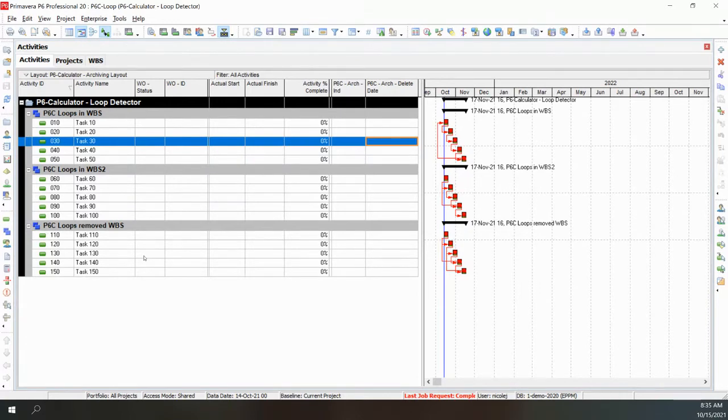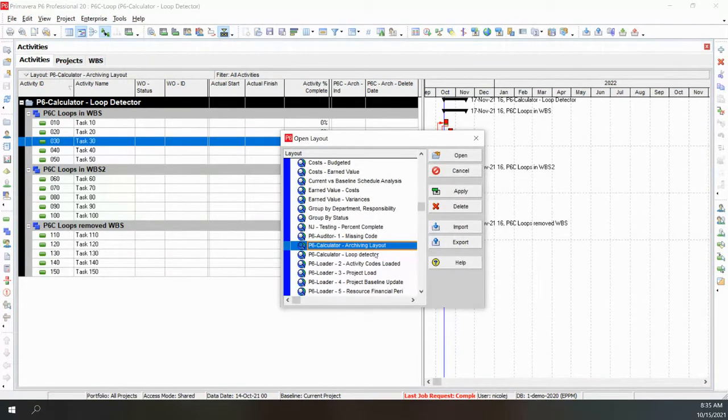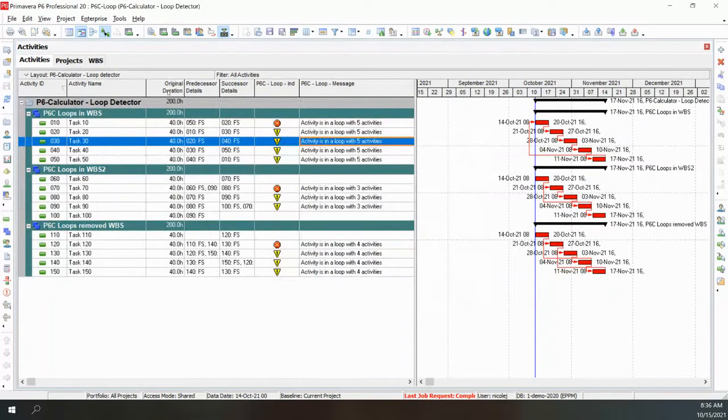Now, there's a job service inside P6 also, which allows you to move the data date and auto schedule. We've had some struggles with it though, with some of our larger clients. It doesn't always work properly, and what we're finding is sometimes it does error out. So we had built an auto scheduler for previous versions, so we are still using that with many clients. And what it lets you do is have the data date move in a regular, consistent manner.